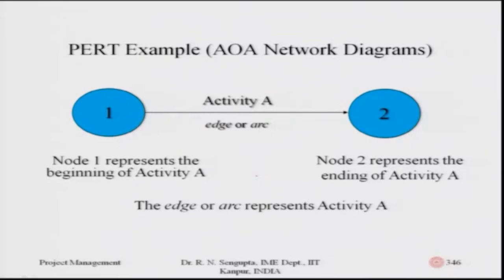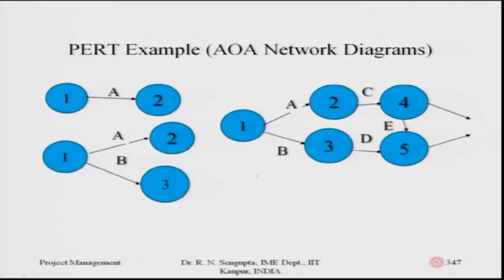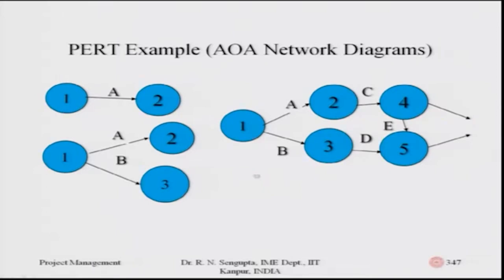Node one represents activity A in the AOA format. Activities are shown in arcs rather than nodes — this is activity on arc versus activity on node. When following one convention, use it consistently throughout the diagram. For example, in AOA, one leads to two representing activity A; one to two or one to three represents A and B; further nodes represent activities C, D, and so on.